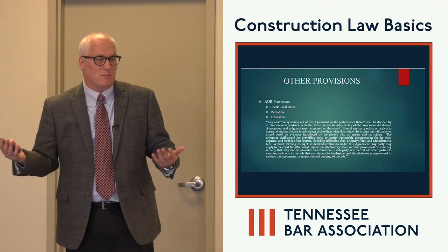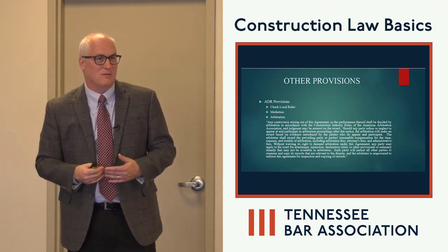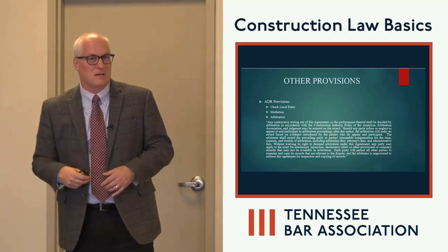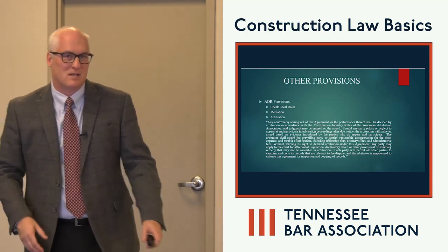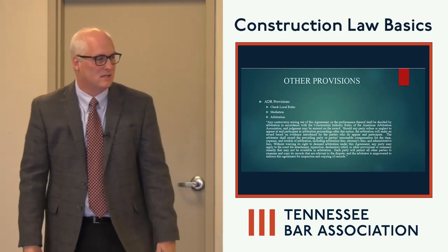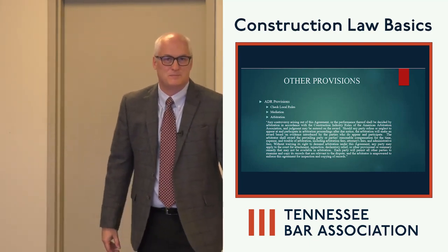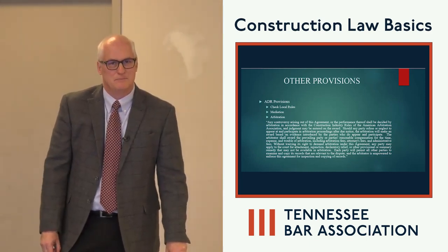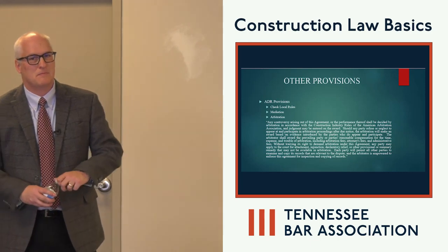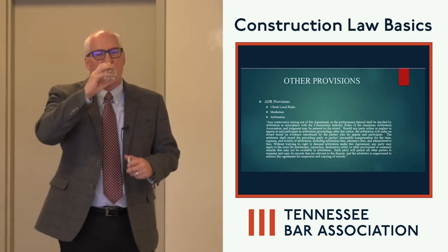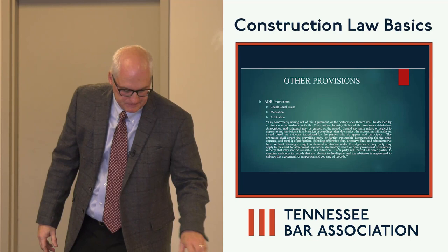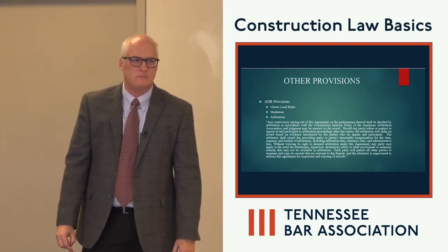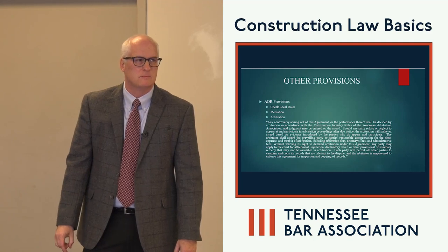If you've got a smaller, even a medium-sized client, a $75,000 or $100,000 hit is substantial. And the problem is, having served on fast track arbitrations as an arbitrator, I don't know if this has happened to you or not, I bet it has. Lawyers go in and they don't get half their case done the first day. And then it goes over to the regular track rules. So that's a warning: if you're going to do a fast track, you better get done in that day, otherwise you're going to default to the regular track rules and have to pay more money.